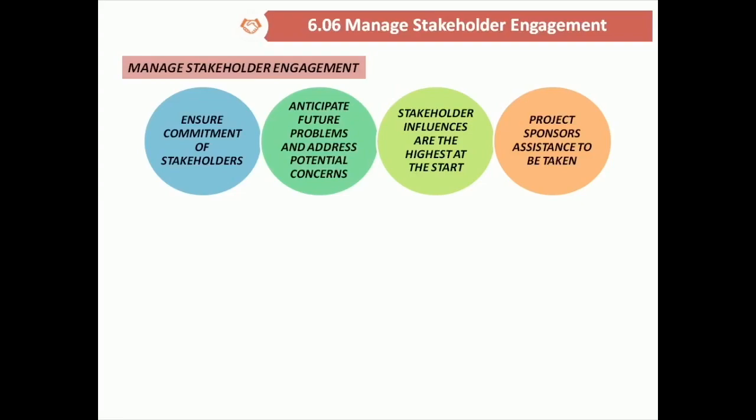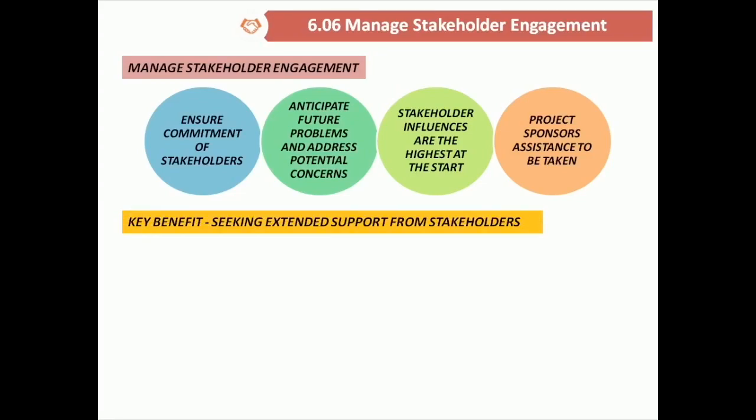The key benefit of the manage stakeholder engagement process is seeking extended support from stakeholders for project success. To manage stakeholder engagement, there are certain inputs. It includes stakeholder management plan, communication management plan, change log, and organizational process assets.